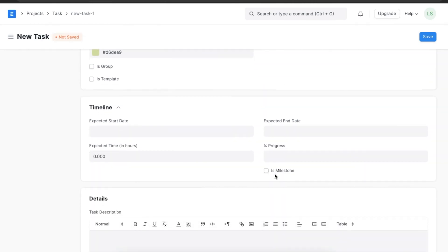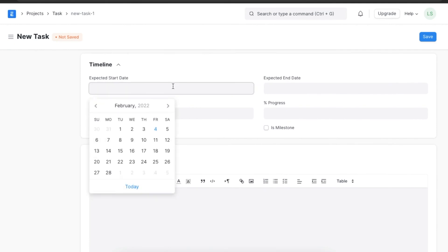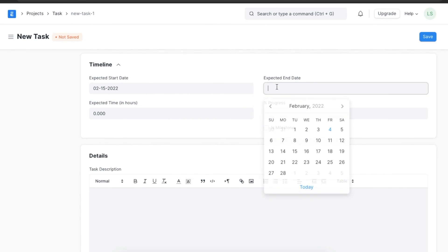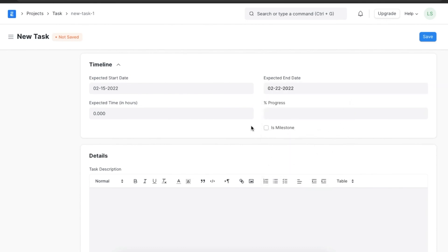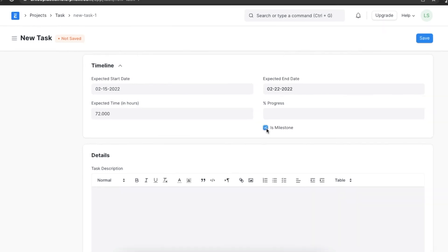Moving on to the timeline section — here we will fill in the expected start and end date for this task. Suppose this task is to be started on the 15th of February and is expected to end on the 22nd; we can add the dates accordingly. We can also add the number of hours this task is expected to take, and use the checkbox to define if this task is a milestone in the particular project.